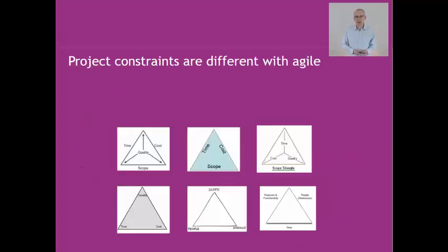I mentioned that prioritization is quite a fundamental concept in Agile, and that is because life has been different if you go back over the decades. Traditional project management has used a different set of constraints. If you like, this is epitomized by the iron triangle or the TQC triangle, namely time, quality and cost. This, if you like, is how most people have been brought up over the decades, that these are the three variables that we use. Now, when I say three variables we use, even then you still shouldn't be using quality as a variable. Quality, or the quality level, should be sort of decided at the outset, and the business case will probably be predicated on this.